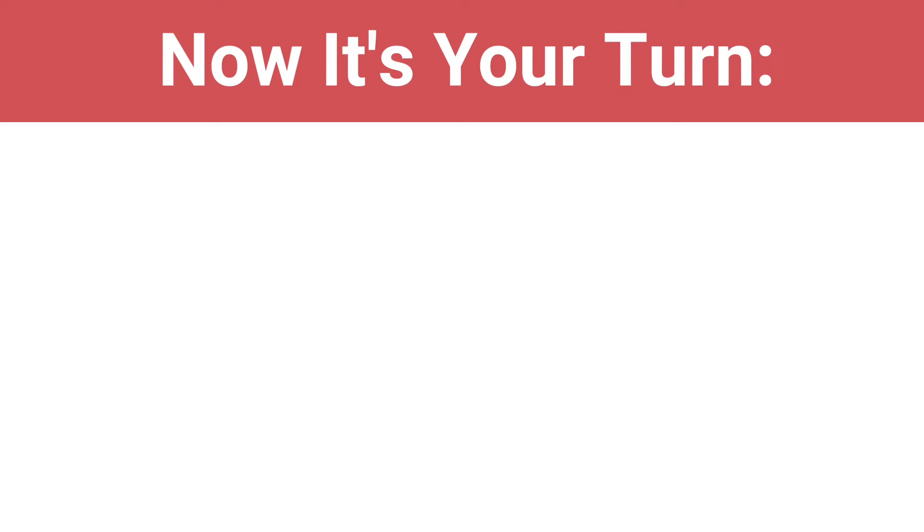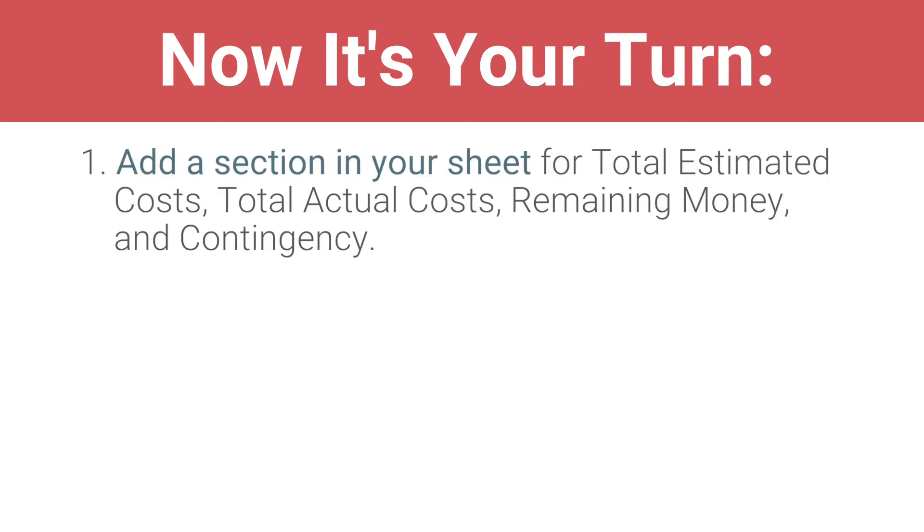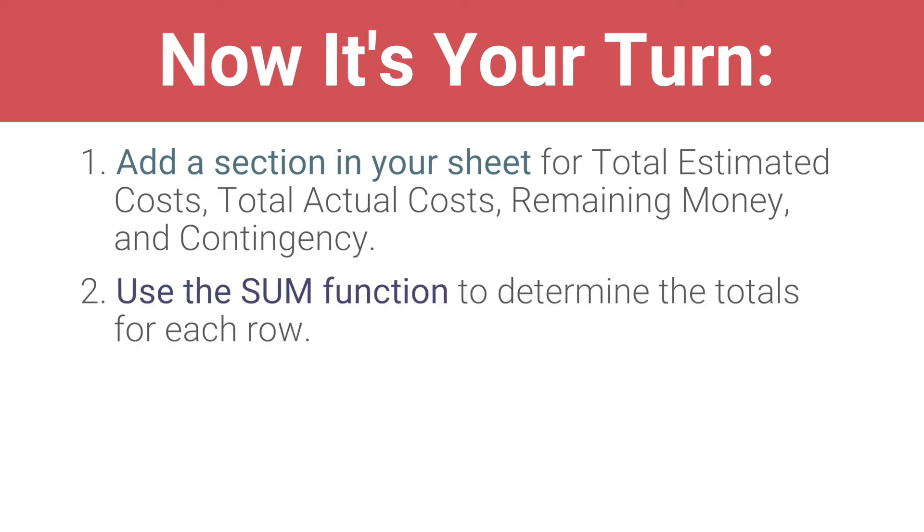In the next video, you will use conditional formatting to make negative numbers stand out in red. Now, it's your turn. Add a section in your sheet for total estimated costs, total actual costs, remaining money, and contingency. Use the SUM function to determine the totals for each row. Create a contingency budget.